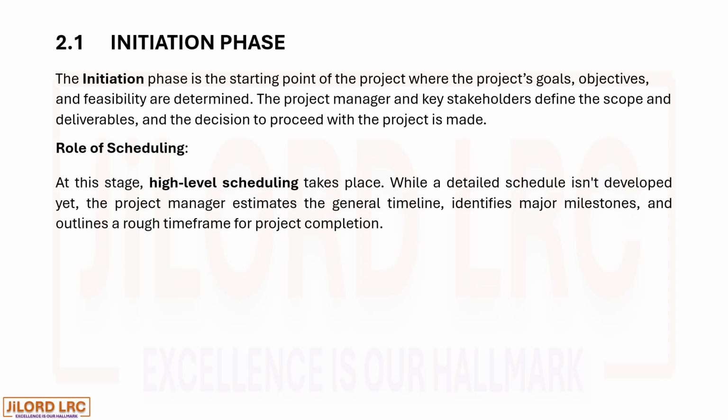Role of scheduling. At this stage, high-level scheduling takes place. While a detailed schedule isn't developed yet, the project manager estimates the general timeline, identifies major milestones, and outlines a rough time frame for project completion.